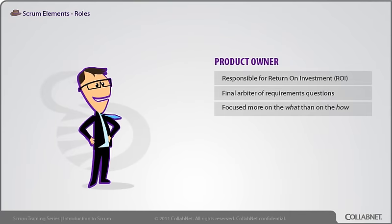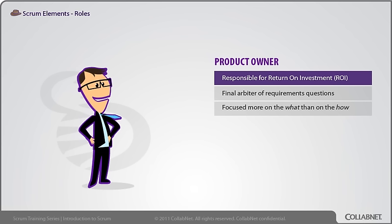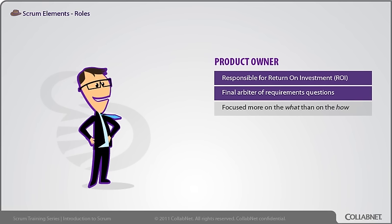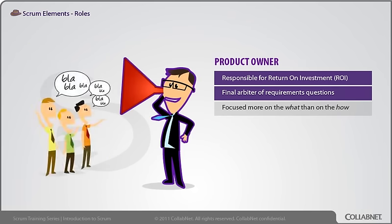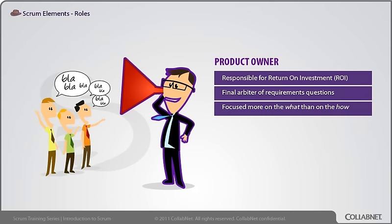The Product Owner is the single individual responsible for return on investment (ROI) of the product development effort. The Product Owner mostly exerts that influence through the prioritization of the product backlog and is the final arbiter of requirements questions. The Product Owner must have the vision behind the product development — a detailed roadmap may not make sense under high uncertainty, but a vision is important. If anyone else wants anything from the team, they need to work through the Product Owner. He's the one person making prioritization and business decisions for that team, focused more on the 'what' than the 'how.'